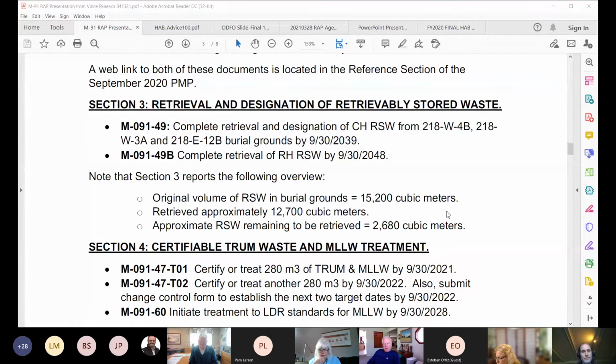I didn't mean to imply that milestones were not important, but the fact has been that we allow them to slip, and we didn't know that they were going to slip until they slipped. And that's where a baseline or a critical path schedule would help us think about what issues have to be dealt with. Yeah, it would have to be a short-term schedule because there's so many external forces, when can we start shipping to WIPP is the biggest one.